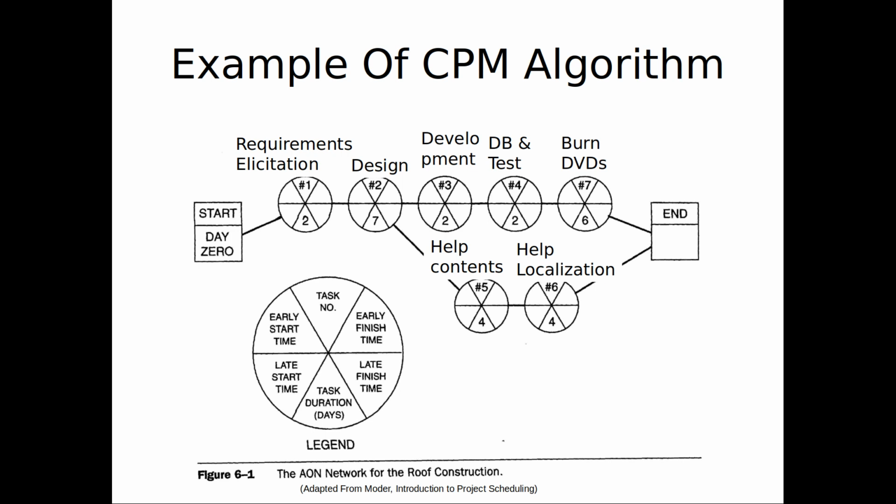Each of these nodes, when you talk about the float of a node, it's the difference between the early start and late start. It's the difference between when we can possibly start it, given everything that goes before, and the latest we could start it without delaying it. If those are the same, we have to start it at the earliest possible time that we can. Do you understand that? On the other hand, if those are different, we have some leeway. Without delaying the project, we could start it later than the earliest we possibly can. Do you understand that point?